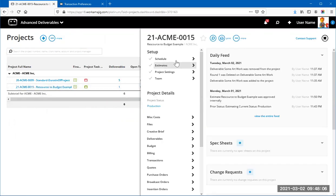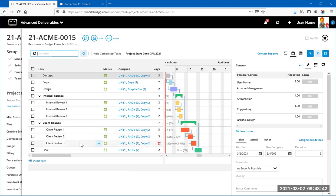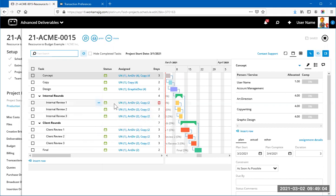More traditionally, looking at the second project's schedule, this one has predecessors, start dates, and due dates for each task. In this case, I've created a task for each review round — three internal rounds and three client rounds — with the benefit of allocating time to each round. Typically you spend more time in the first round and less in subsequent rounds, but this structure allows you to resource at that level of detail.